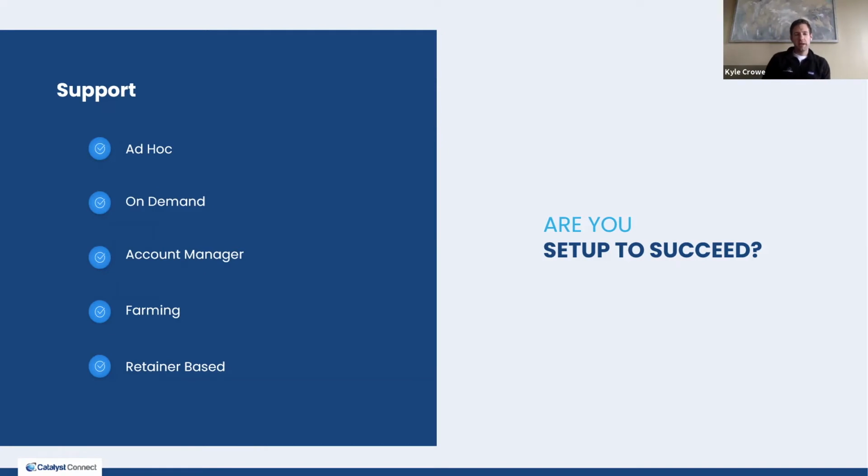So I think it kind of goes back to that first slide, John Mark, where you talked about good project management is good communication and organization. So trying to balance both implementation and support on those implementation projects. Those are really the drivers of our business. And we try to really align on expectations when we begin any project implementation. So going through a timeline and how many hours we are expecting to allocate towards it over the course of however many weeks it may take to implement.